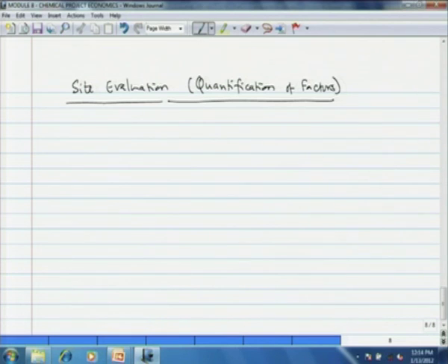For that purpose, we have to form a team of 2 or 3 senior engineers having design and construction experience. One of them should be a civil engineer who will assess the civil aspects like site specific and location specific. The second one should be a management graduate, and the third has to be a chemical engineer, and together they can prepare a questionnaire and collect the relevant information on all of the factors related to prosperity for the various sites under consideration.